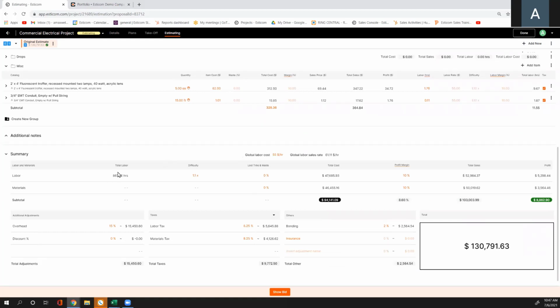So again, underneath the summary, I have all of my labor hours from all of my groups here, times my burden labor rate gives me my labor costs, my material costs, my total job cost, right? My burden labor rate plus my margin or markup gives me my global sales rate. My total job cost plus my margin or markup will give you my sales price. My profit, which is obviously the difference between my sales price and cost.